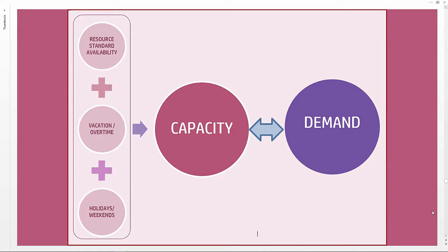This template uses certain inputs to automatically calculate the capacity — for example, the resources' standard availability, any vacation or overtime taken by the resources, and any company holidays or weekends. All of these are factored in to calculate capacity automatically and then compared with the demand data to calculate the surplus or deficit. The term resource is used throughout, and is interchangeable with employee for this template.